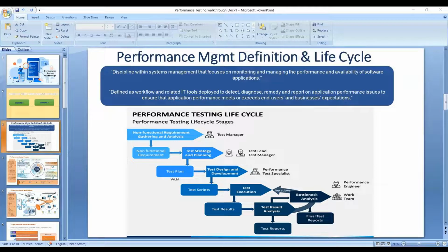Similarly, if I talk about projects, we'll show you the test plan and strategy document, and you will understand properly. On a high level, we have to finalize the timelines: by what date the requirements like environment readiness will be there, by what time your script creation will be done, at what time you'll be running the load test, then at what time you'll be running your scalability test or soak test, and at what time you're delivering all your results.